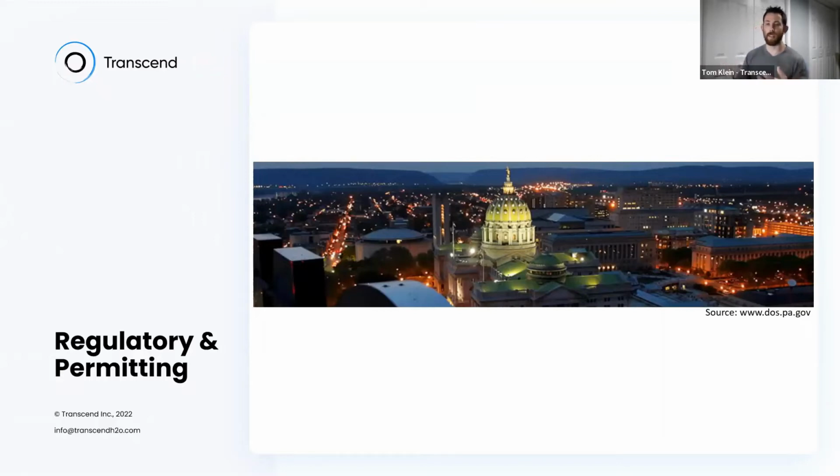You could run designs, run as many as you need, and use that to engage some of your environmental regulators early in the process. If they don't like something that you're doing with a particular design, a particular technology, you don't have to bear the risk of completing a full design before you hear their opinion on it.